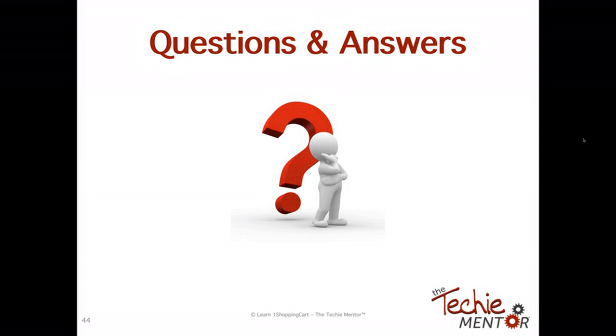Cindy, not a complete change, just clarifying for both of us. So I should do an addendum. This is my scope creep. Yes, I would just do an addendum. If it's just a tweak, then I would do an addendum to make sure that, if your timeline's changed or your prices changed, all of that stuff is in the addendum as well. So it's very clear. Don't leave any room for gray, if you will.